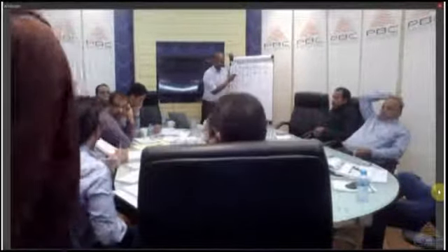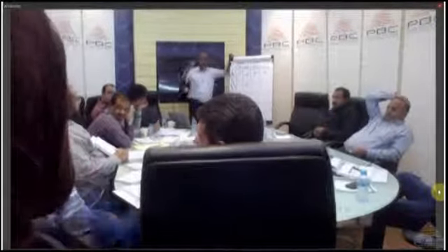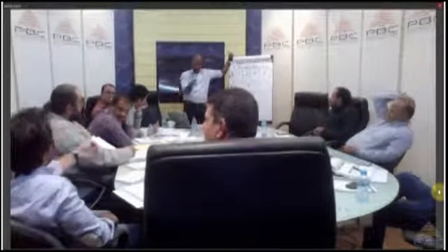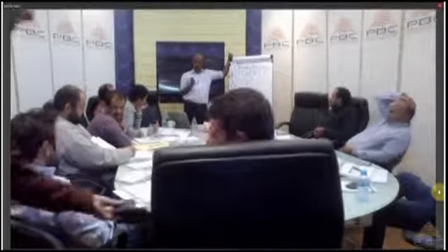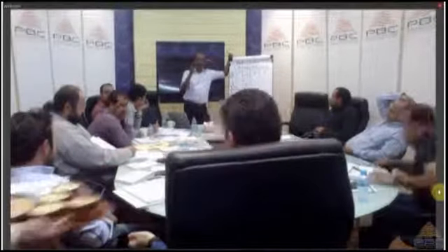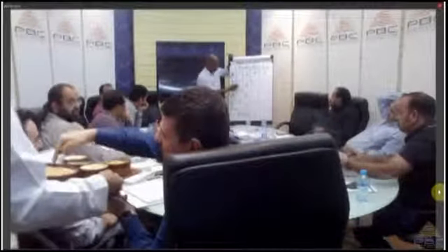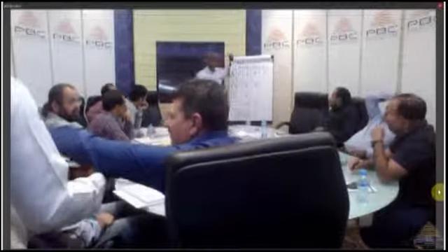Why do we take the decision to consult? No, before. To be consulted before. Before doing, yes, consulting, exactly. After doing it, it's informed. Okay? Now, choosing the menu, again, we're going to leave this to who?